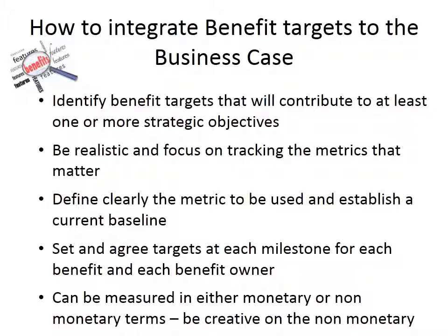But if you use, and I certainly recommend using, KPIs or metrics already developed and used in the organization, you need to identify the current baseline so you can demonstrate at the end of the project that you really delivered the value. You really moved from the current position to an improved future state.